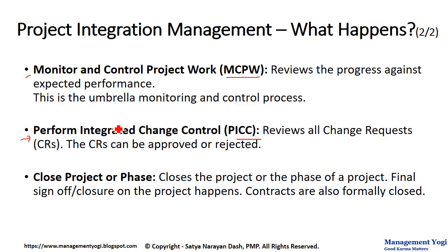If the CR is approved, then you will have the output of approved change requests, which is coming from the PICC process. And the approved CR will be implemented in the previous process of direct and manage project work.